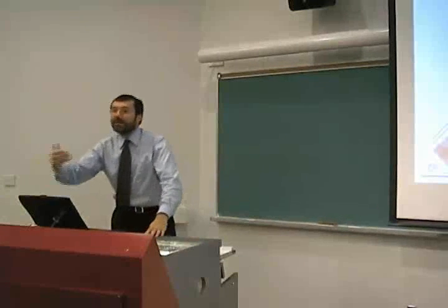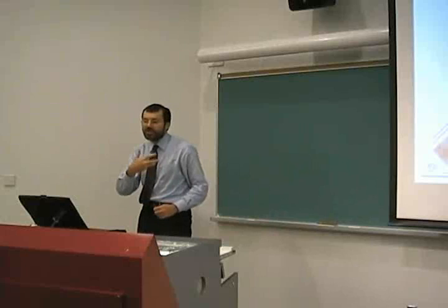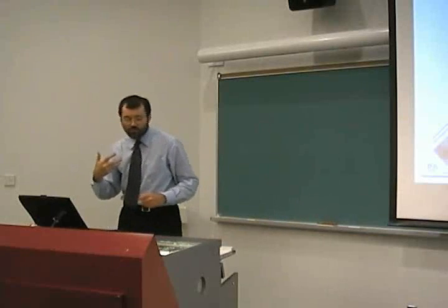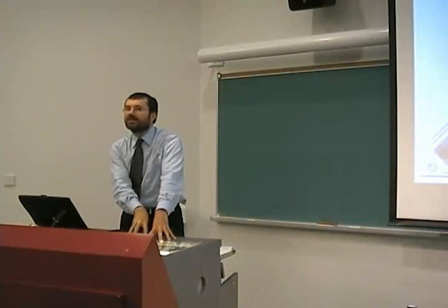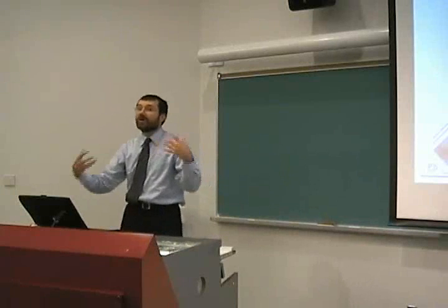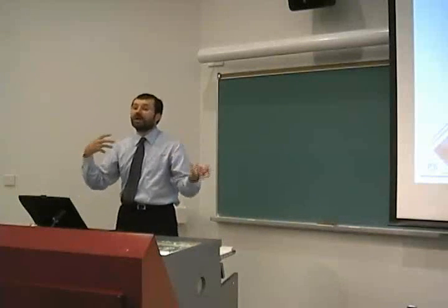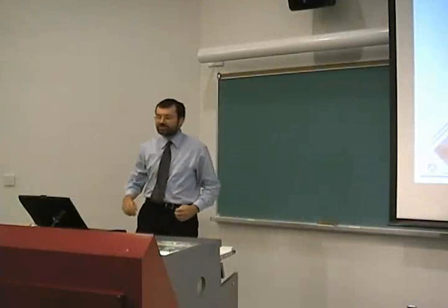As time goes by, and you've got some drafts of the requirements, then you get to the point where you can start to negotiate. Then you can start to say, okay, we've analyzed this a bit, and we've decided that it seems reasonable to do this and this, but this third thing here is going to take way too long. It'll take us 6 extra months if you want that. So what we'd like to do is develop these first 2 things in the first release, get those out to you, and then work on this second part. And as part of the negotiation, the clients might well say, okay, that's a reasonable compromise. We'll talk about approaches to compromising and approaches to negotiating in the brainstorming context and in the JAD context in a minute.